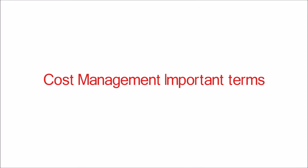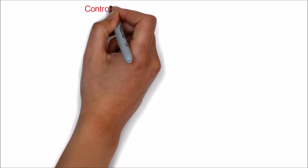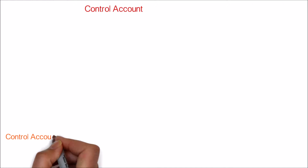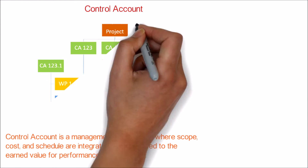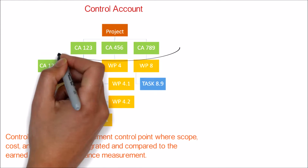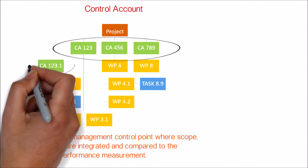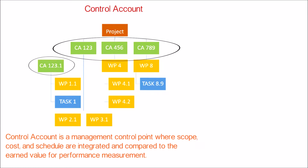Let's look into some of the important terms in project cost management. Control account is a management control point where scope, cost, and schedule are integrated and compared to the earned value for performance measurement.